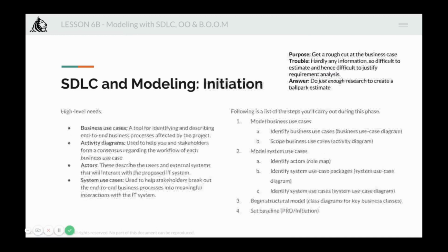So if you are building something very, very large and you're using a non-agile process like a waterfall, the requirements gathered in this particular stage would be baselined, and any changes to this would undergo a change management process. Because any change after this would impact the entire architecture and can turn out to be very costly, both in terms of money and the time taken, right?